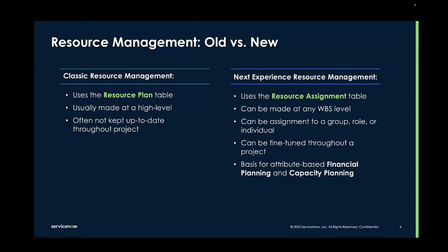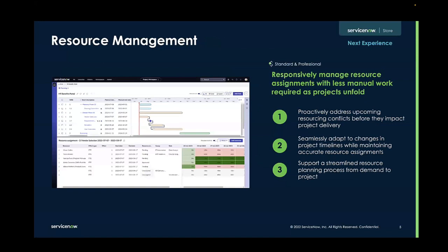These resource assignments can be fine-tuned throughout a project. For example, you could first assign work to a group in a role, and then later on in the project assign that work item to an individual. The enhancements to resource management help project managers and resource managers respond to resourcing needs and conflicts proactively and with less work before they impact project delivery.